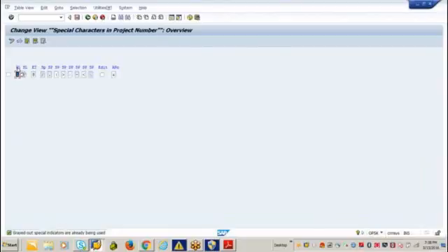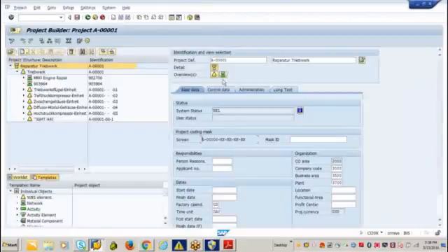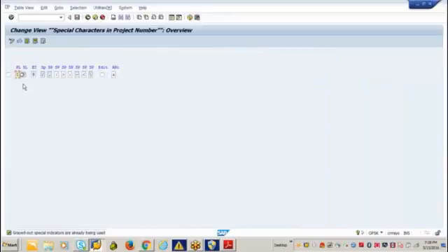So here you can see PL. PL is nothing but the project length. So what is this project length? Here you can see the code starting with A, right? So they have taken the first initial letter of a project as A, which is controlled as 1 only. Here I can make a project code up to 5 letters to start with. So it can be either 1, 2, 3, 4 or 5. Based on the coding requirement of the client, you can take any of these.